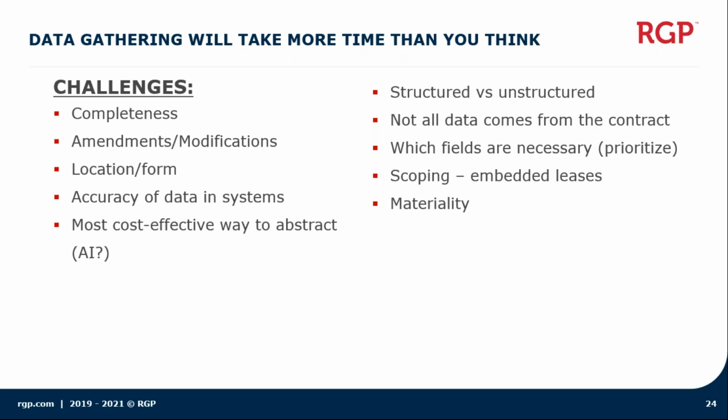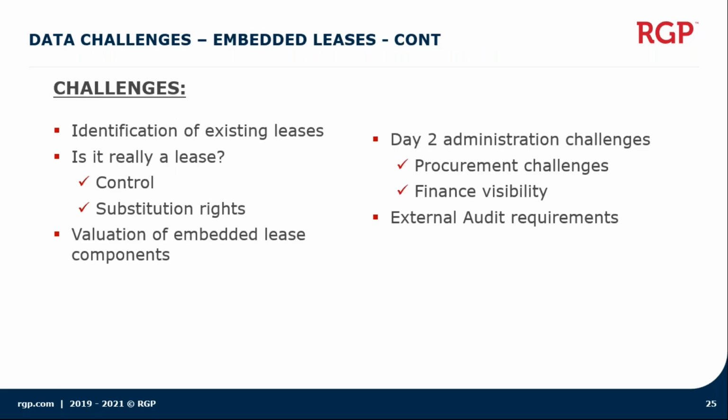Prior to loading anything in the platform, your external auditors will expect that you've done some type of secondary accuracy check or validation of the data. That will be an iterative process that you have to go through prior to even ingesting any of that data into the system, and it's important to understand that this will take a significant amount of time. Additionally, we need to make sure that what we're capturing is actually a lease.